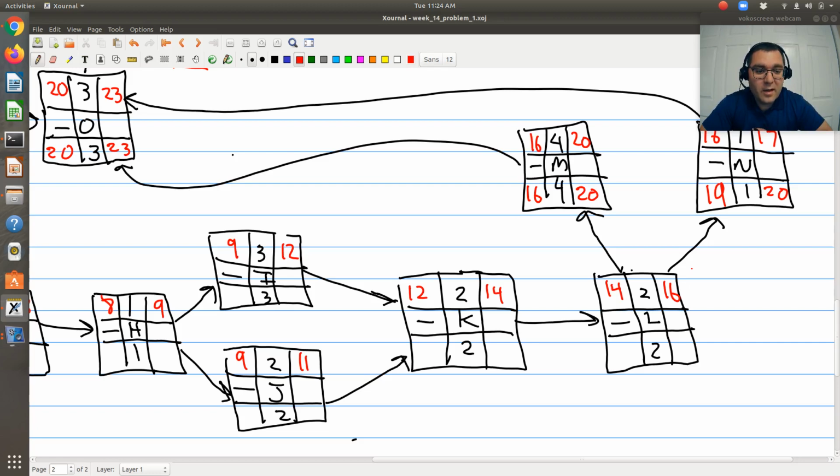So when I try to figure out the latest possible finishing time of L, I'm looking at the minimum of the latest possible starting times. If M needs to begin by day 16 for the project to be completed on time, then L better finish by day 16 to make sure M can start on time. It's 3 days earlier than needed for N, but that's okay. Once L is completed, N can begin by day 19 without a problem.